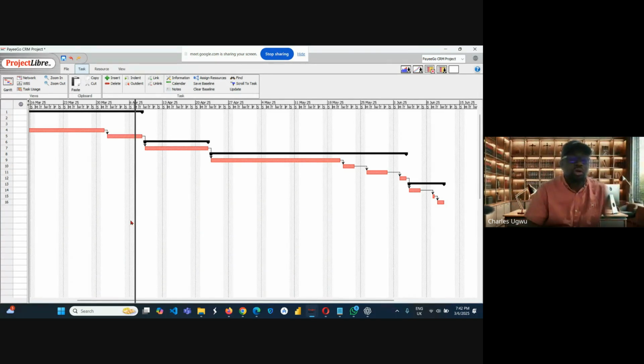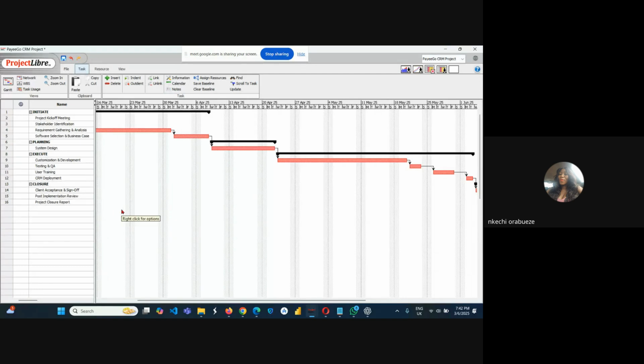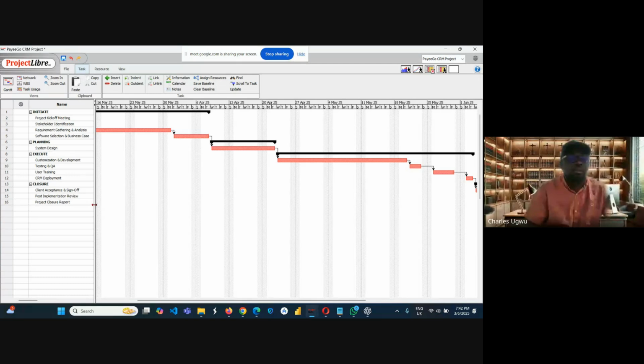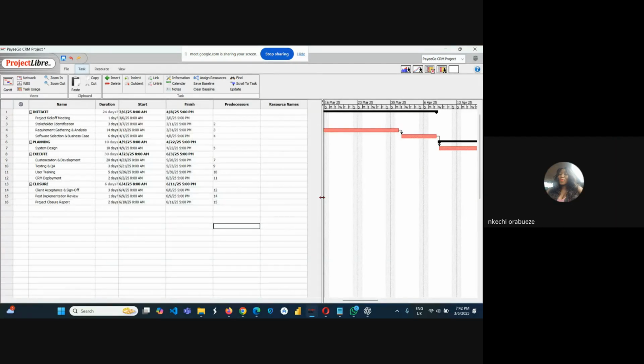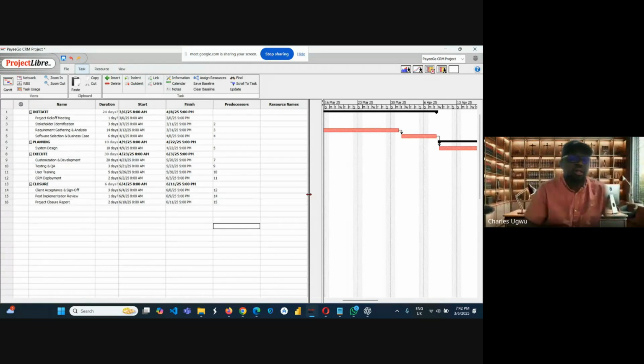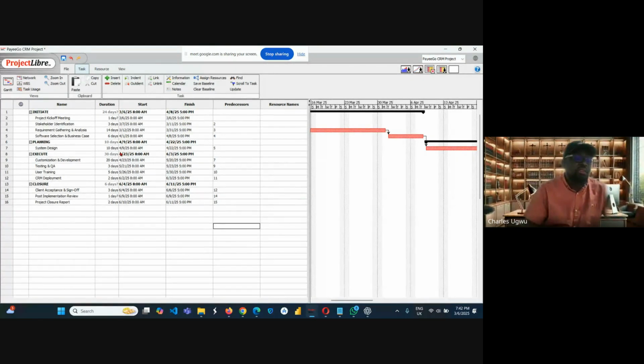It's not captured. Can you call it milestones? It is not a milestone. A milestone is an activity. A stage cannot be a milestone. For instance, when you finish software selection, or let's say business case, meaning this is the end of this initiate stage, you can say that after this activity we have arrived at a milestone.